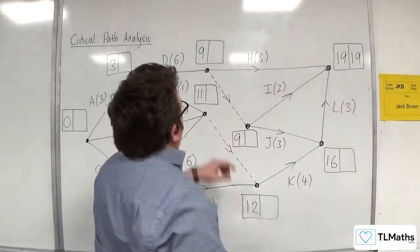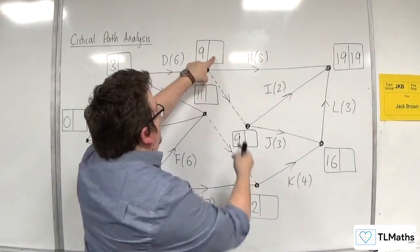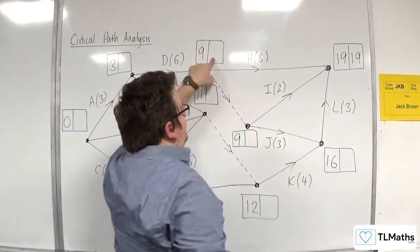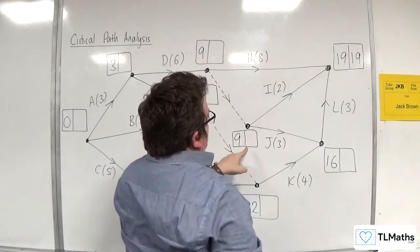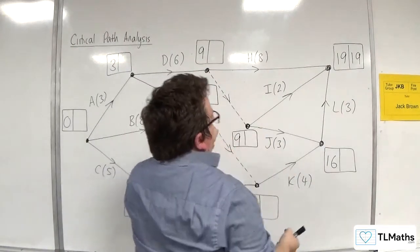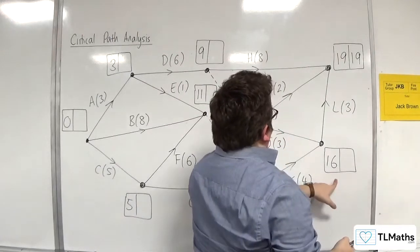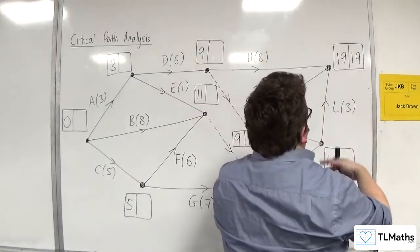Now, we're not going to go straight to that one because there are two routes back. We can't go to that one because there are two routes back, so we're going to have to go to this one. So 19 take away 3 is 16.